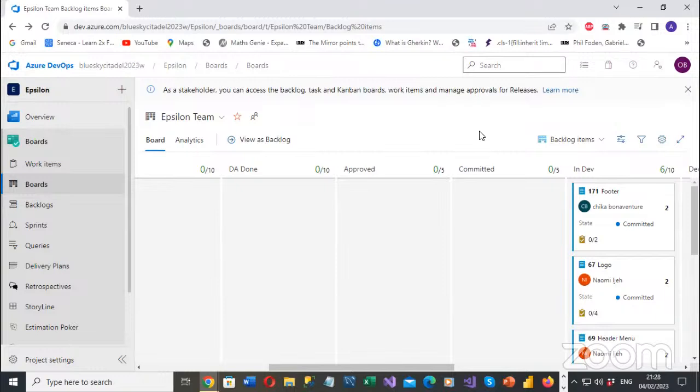Let's assume that you have 3 developers. Okay, you have 2 developers. And the tickets are in dev. What's the name of your second developer? That's Bolaji. We have Chika and Bolaji. So you have 6 tickets. The way it works, the developers will discuss with themselves and split who is working on which. All the tickets sit in dev until they move it to dev done.